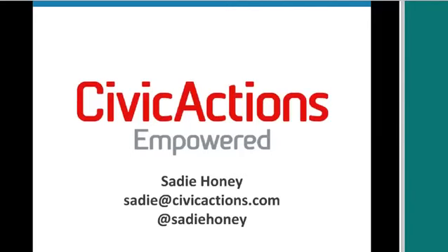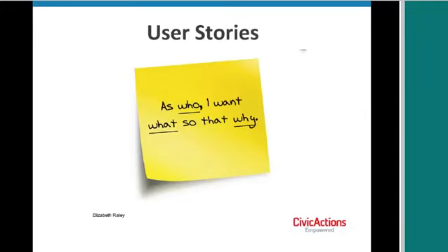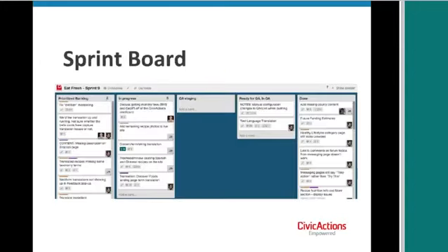So for an example, say you have 5 items and one of them has a really complex user workflow. That sprint board would have the prioritized backlog, and maybe there would be a column for UX. Instead of just saying progress, you could have a column for UX. So the difficult thing would go into the UX column, and the UX person would be working on that.